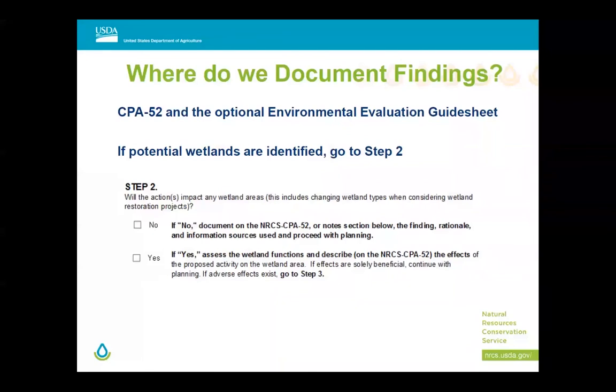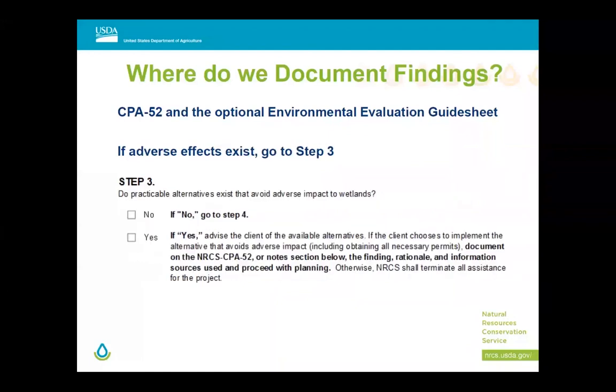If I looked at it and I had some concerns and I thought, well, each individual little hole, maybe that's an issue, can I avoid wetlands impact? Well, maybe I could go down here and ask, do I have practical alternatives that exist? What if I don't have my fence in the wetland? What if there's uplands right along the edge and I was able to shift my fence out of the wetlands up to the uplands? Yep, I was able to 100% avoid that by putting my fence in the uplands and not impacting them. So this one is a bit of a fuzzy example.